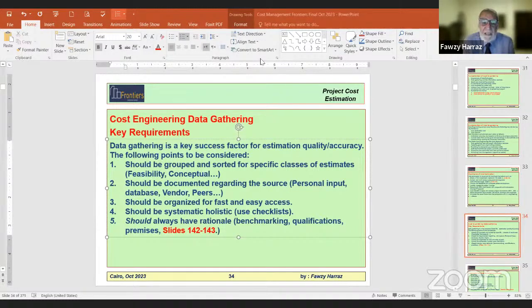Whether you have the luxury of time, because some projects on the business plan of the owner have a deadline. If it is a new product and they want to catch the market, or if they have a commitment to the government or to society to start providing power or oil imports or whatever. Remember that the bidding and awarding cycle takes normally 3 months at best, maybe 4. So 4 months on the business plan is not something that you can ignore. So this is the thing about the need to rebid.